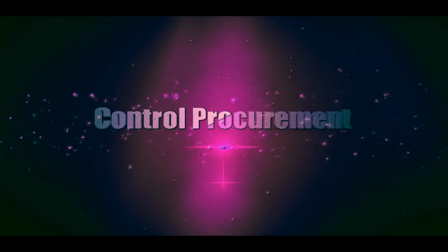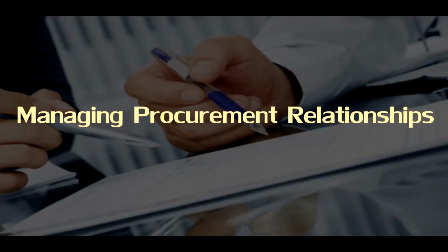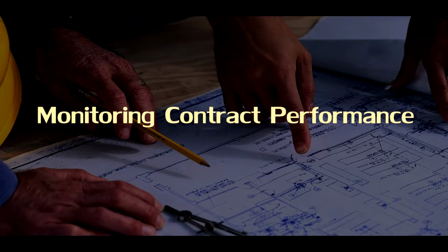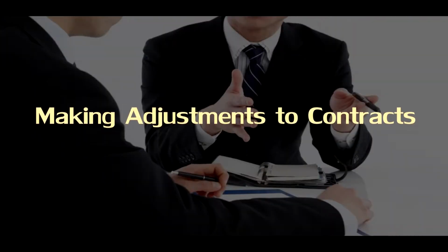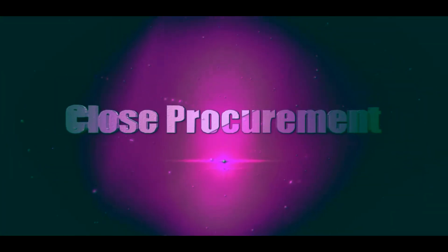Control procurement. Control procurement is the process of managing procurement relationships, monitoring contract performance, and making adjustments to the contract as required. The essential benefit of this process is that it ensures the parties to the contract meet their contractual obligations as agreed and legally enforceable.